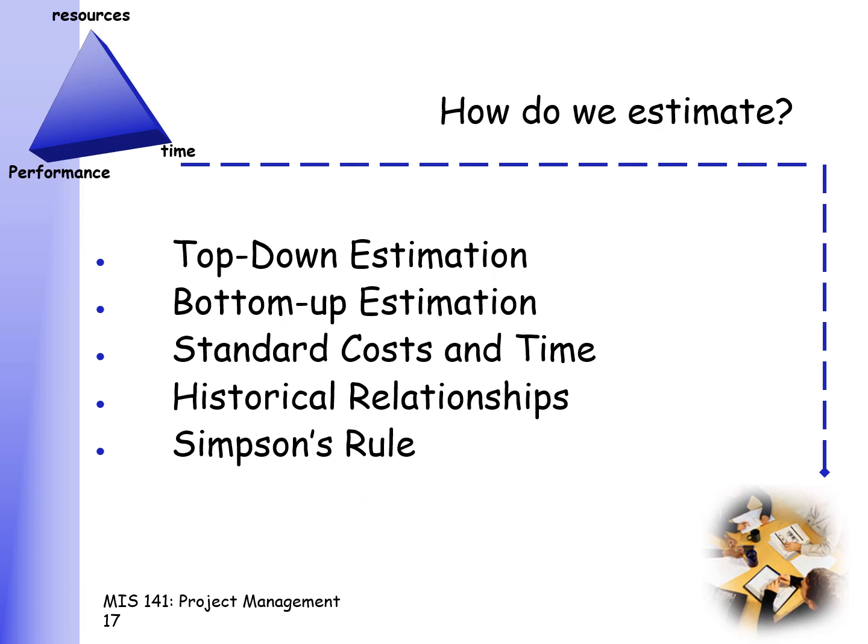Please take note though that ideally it would be good to use the same strategy across all of the work packages and all of the activities. That is, if you're planning to use standard cost and time, use it across. But sometimes there are situations when you can't use one strategy across all of them. So you can use a mix. Best practice though is to just use one strategy.